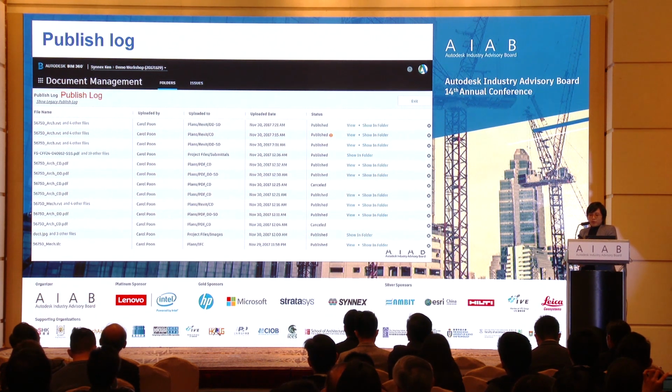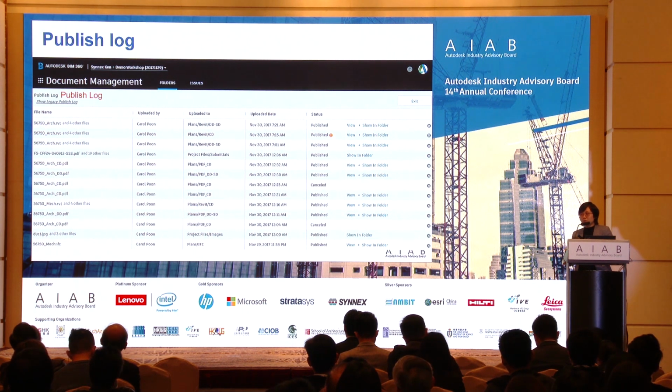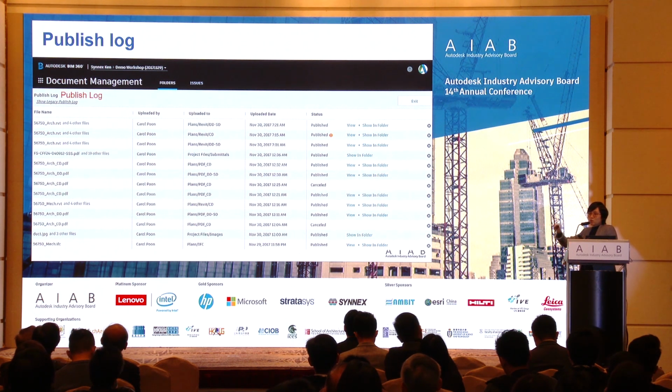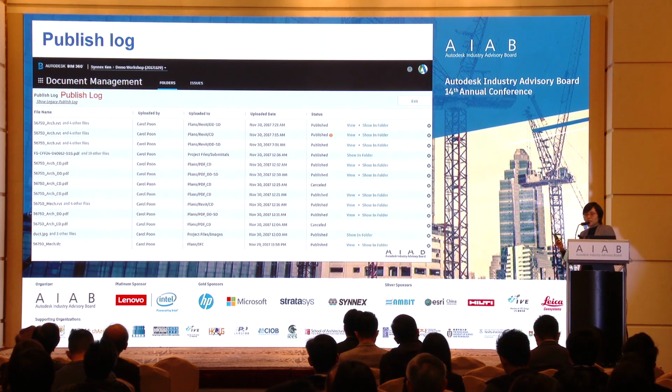Also, some clients have asked me whether we have some update of the folder. For example, I have teamwork. I'm the BIM manager, but I am not sure when my staff update the folder. Inside BIM 360, when you subscribe to the folder, whenever a person uploads any documents to the folder or synchronizes the model by C4R, you will get an email notification immediately.